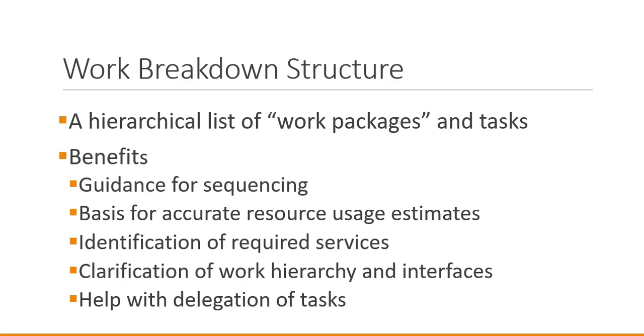With our work breakdown structure and the details that we have of our work packages and tasks, that will help us to clarify sequencing. Also, understanding the resource requirements that we have is difficult to estimate accurately at a high level. When we break down into more and more detailed tasks, it will enable us to create a more accurate estimate of what we're going to need from the standpoint of time and manpower and money.